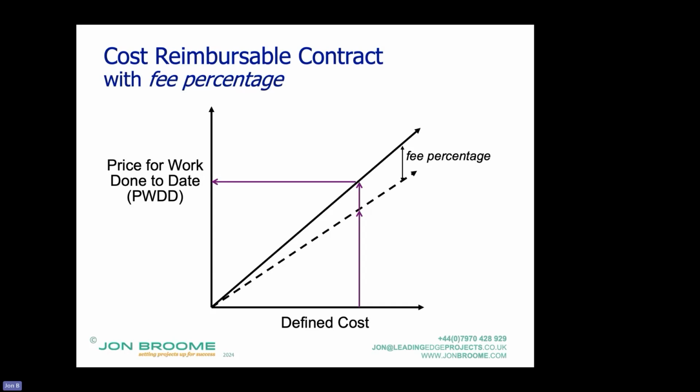So first of all, within the contract, there are some disallowed costs, as in if some will be fraud potentially under contract law. If there's defects where they haven't followed a method stated in the scope documents, that's a disallowed cost. Correcting defects after completion, that's a disallowed cost. Not justifying the cost in their accounts and records, that's a disallowed cost. So there are various things which are disallowed cost within the contract. But perhaps the biggest balance is I'm a repeat order client. If you rip me off, I'm not going to use you again. That's perhaps the biggest incentive to be responsible as a contractor.